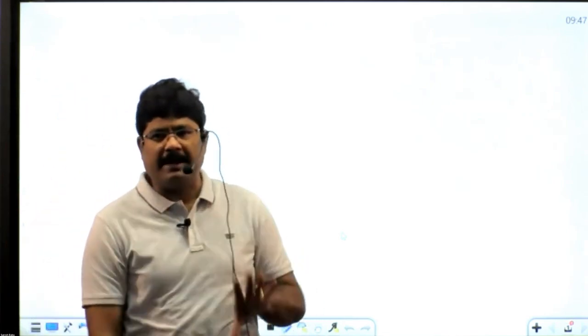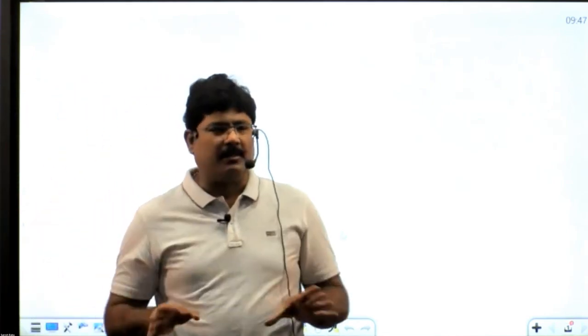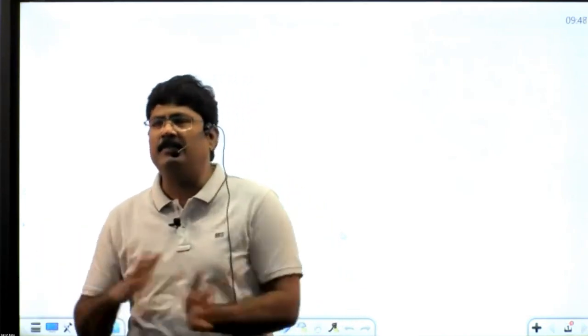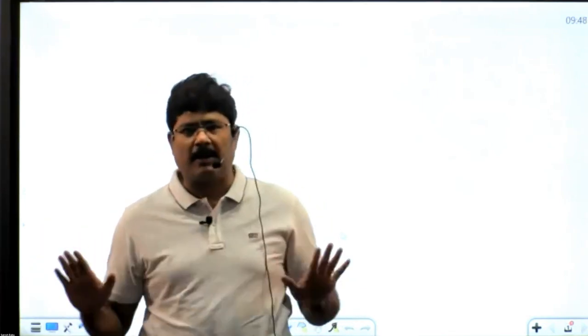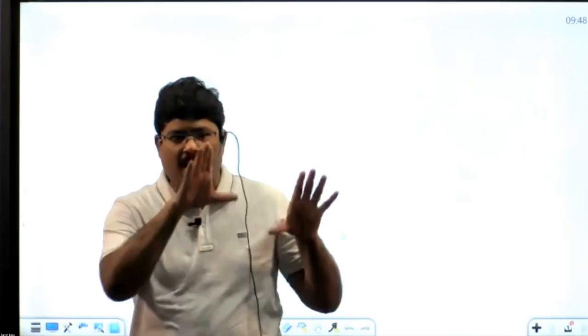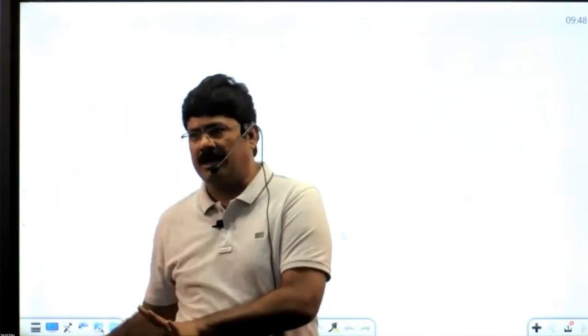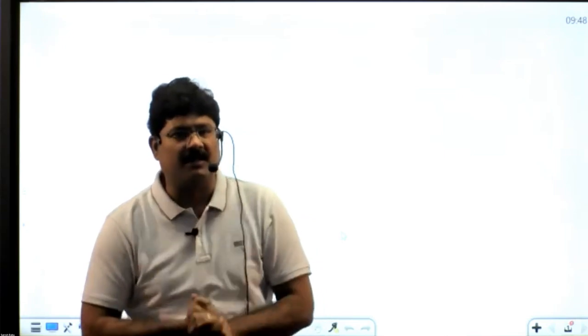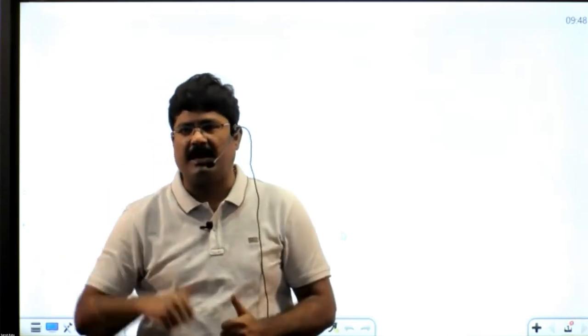So from the Scrum Master end, there is still one work pending, planning the work. What are the epics? What are the stories? What are the tasks we have to finish in the first schedule? Sprint planning. Once the sprint is planned, committed, then the developers and testers will start working on the sprint. Once all items reach the status done, first sprint completed, the Scrum Master will plan for the second sprint. Tomorrow we'll see the rest of the activities in Jira.